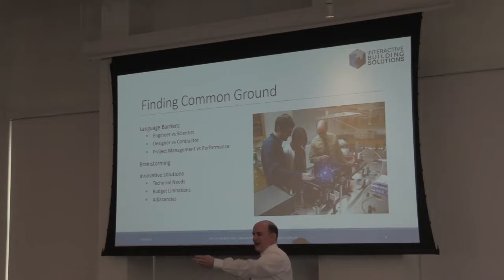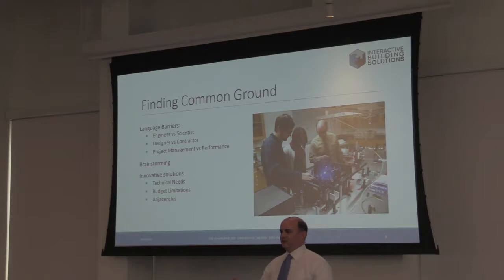Anyone, I mean, I'm seeing you frown. Anyone who hears that, who knows what we're talking about, knows immediately what the issue is. You need to be able to push the water through your instrument. 2 PSI differential won't do it, so 80 PSI of absolute pressure is useless to you. And there's sometimes where you think you're saying the right thing, and you get exactly what you ask for, and it's absolutely unworkable, and you only realize it when you go and hook up the laser. So this was Don Levy's laser. He was our vice president for research. He hooked it up, and he couldn't use it because it just didn't have any differential pressure to supply.